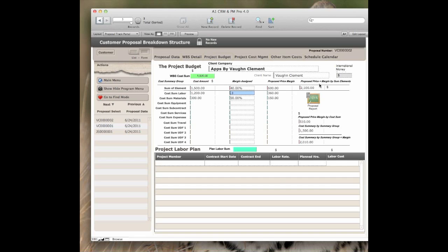As you go down through the elements below, what you can do is summarize or manage the items that are individual within what you produced in the WBS and give them an individual margin so that you can cost them based on the actual work group that's going to be performing the production of the items under the proposal.